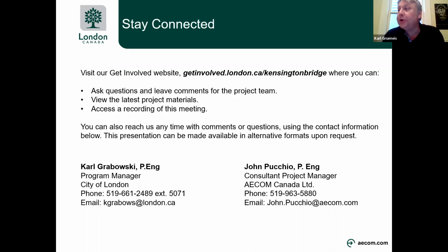I'll just add to that, John. That's a really good question. The ESR will have a section on cumulative impacts where we'll look at other projects in the area and their timing, so it'll be in the ESR if there are any overlapping projects that could interact with each other. And I'll add to that, we're anticipating this bridge to be in 2026. Before that, the project that was noted with the CN underpass by Horton Street is a project that we have scheduled to start next year. I expect that'll be a 2-year project. As staff, we try to coordinate as best we can. There are a lot of things happening in the city, and rapid transit has presented some challenges, but we're trying to manage that as best we can to limit the impacts.